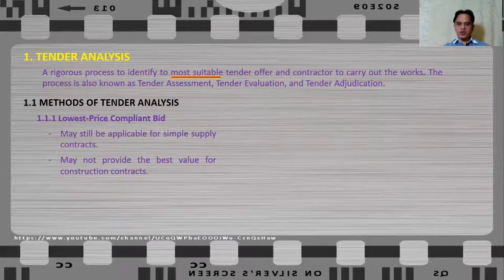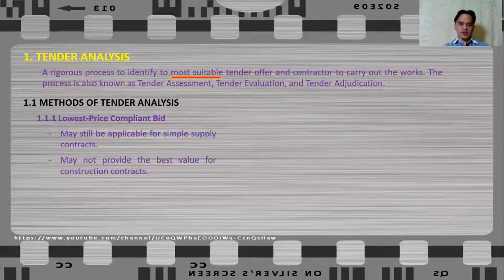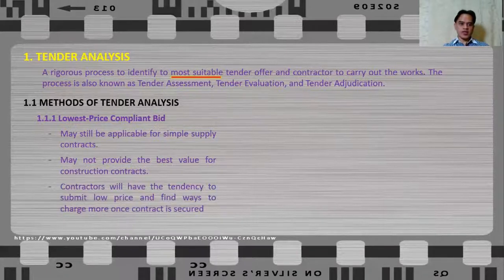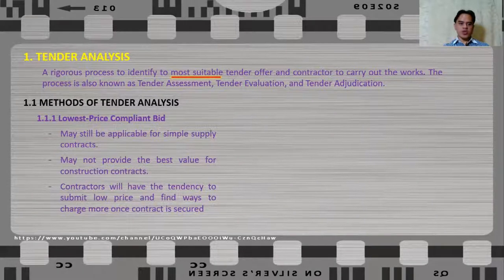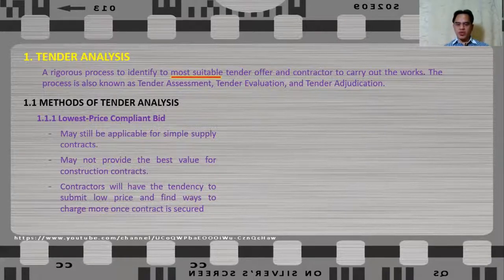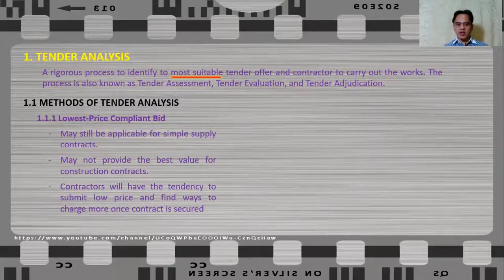This method of analysis may not provide the best value for money when it comes to construction contracts, because for complex contracts such as construction, price is only one of the deciding factors. Also, with this method, the contractor may have a tendency to submit a low price and find ways to charge more once the contract is secured, meaning you may end up spending more on the project.